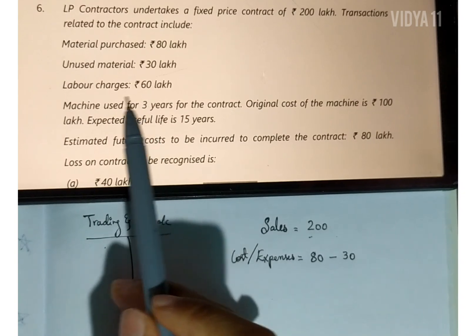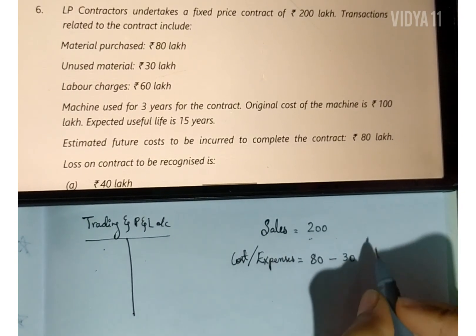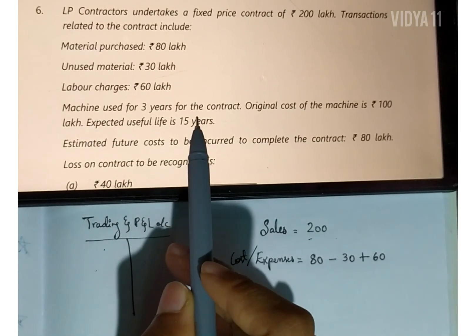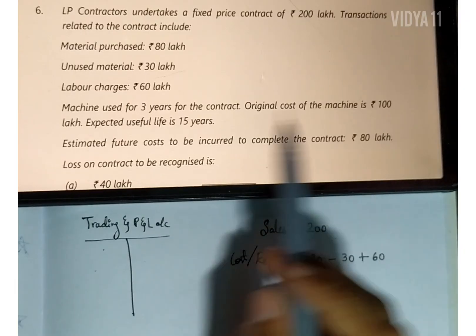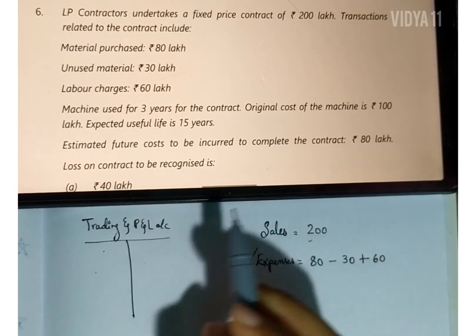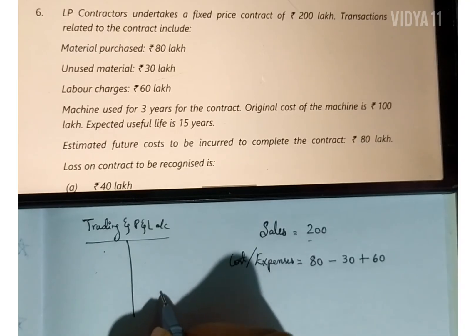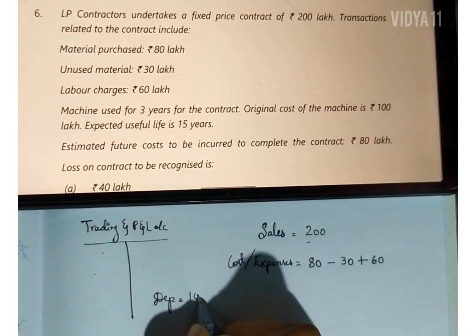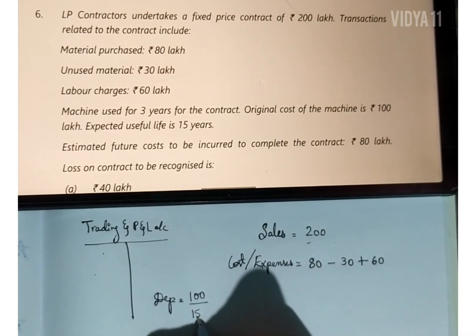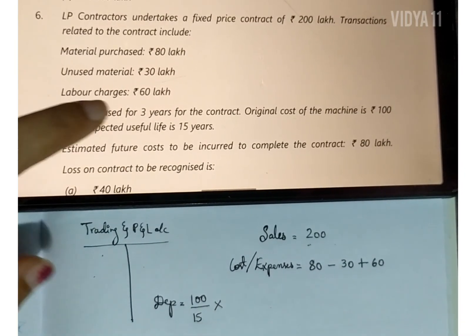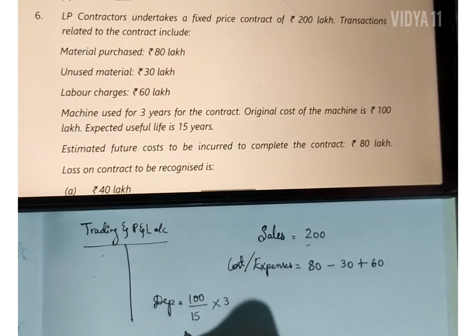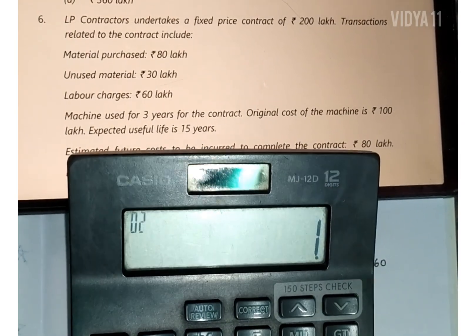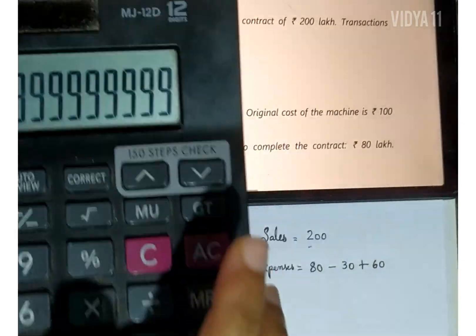Labor charges are again an expense on the debit side: 60 lakh. The machine was used for three years; original cost is 100 lakh and expected useful life is 15 years. Depreciation expense = 100 lakh ÷ 15 years × 3 years = 20 lakh.